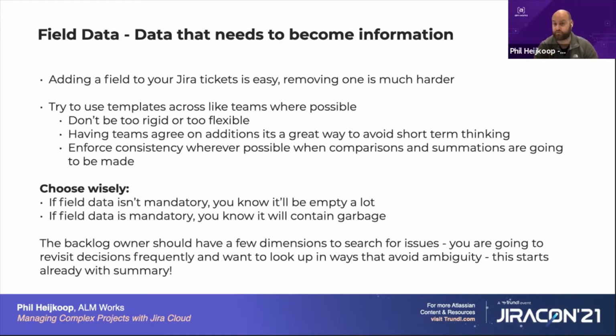And if they don't have information to fill in yet, you're going to get a lot of ASDF keyboard mashing information there. So be prepared to handle either empty data or garbage data. And there is some nuance to this, in the sense that fields may not be mandatory at creation. They can be made mandatory later in their workflow state. We'll dive into that a little bit more, but that's definitely a level of nuance you have.